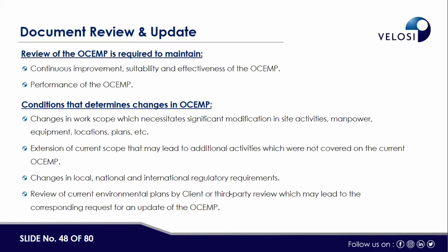And if, on the basis of the client's requirement or the third-party review, it feels that this EMP is not effective, then we have to update the EMP. So in that scenario, we have to update the environmental management plan.